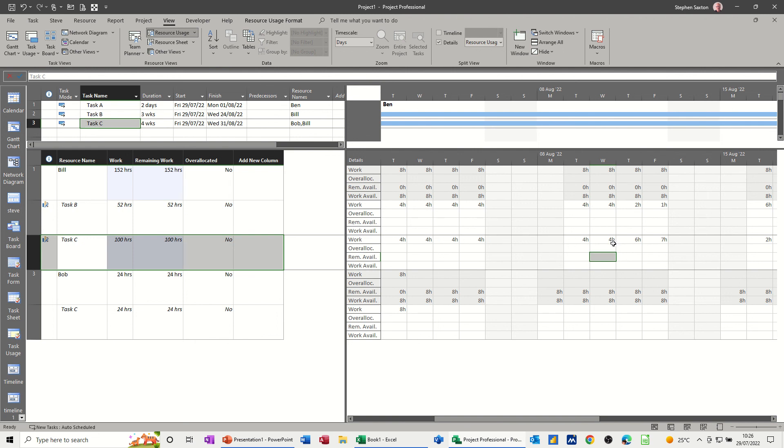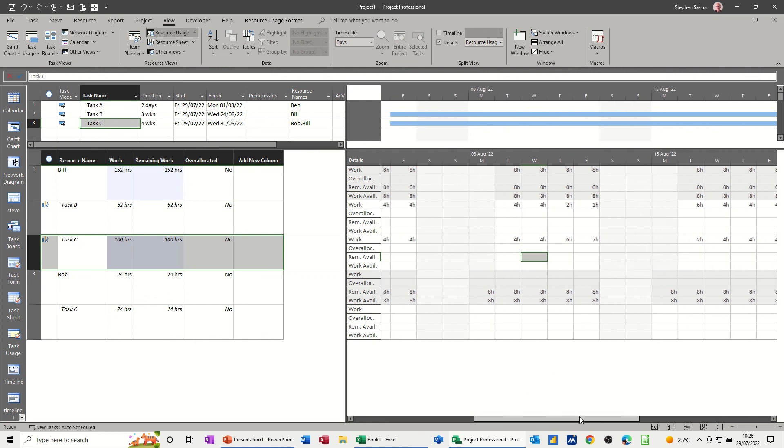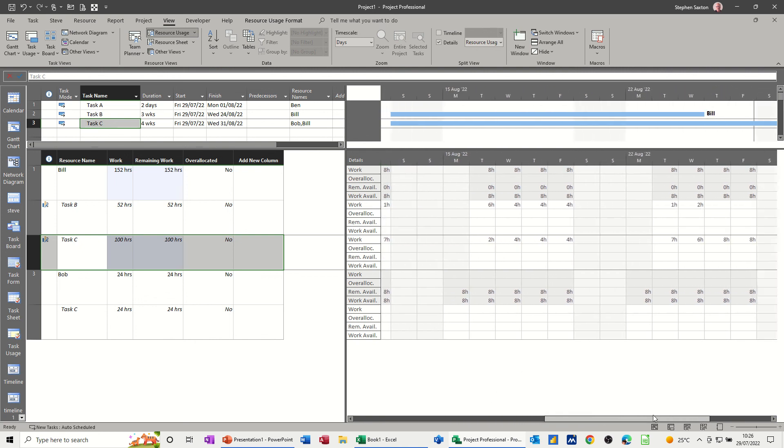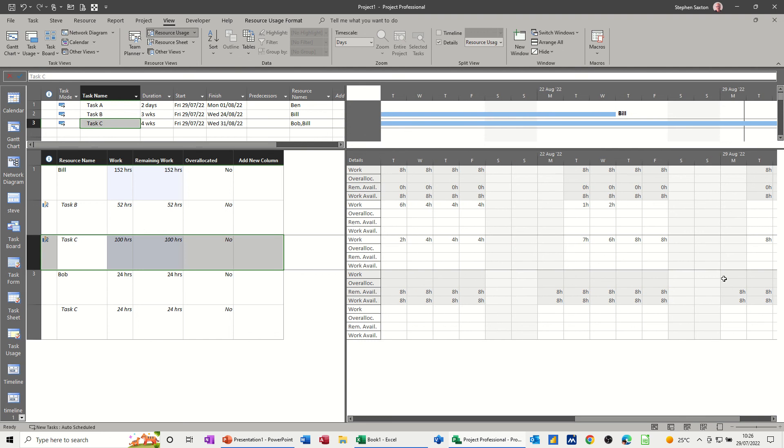And then dropping down to 4, 4, 2, 2, and then in the middle might be zero. No hours at all. And then if it's double-peak, it might go up again at the end. That's what that means. And you can set that up when you're doing your planning phase of your project. It's totally up to you if you want to go down to that detail.